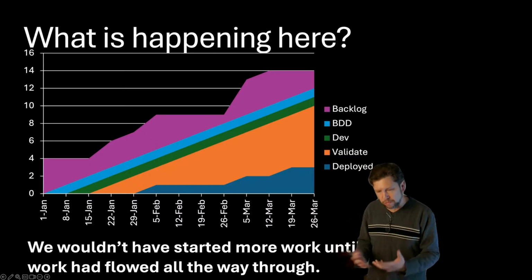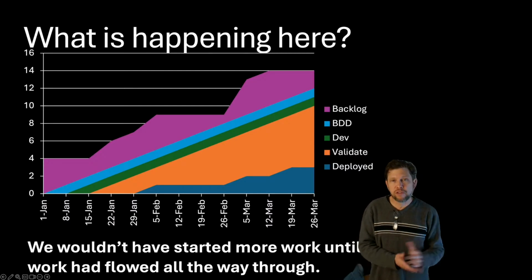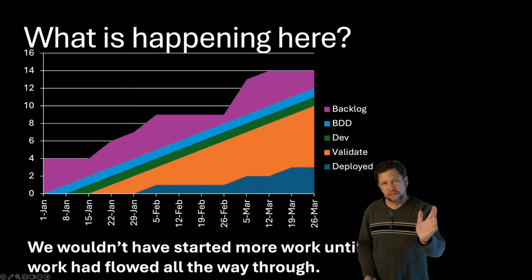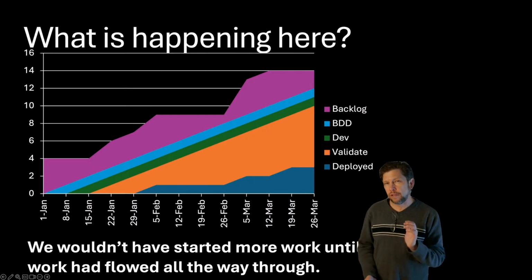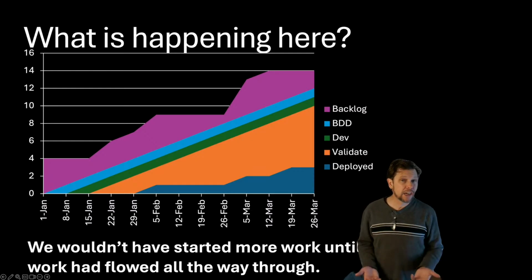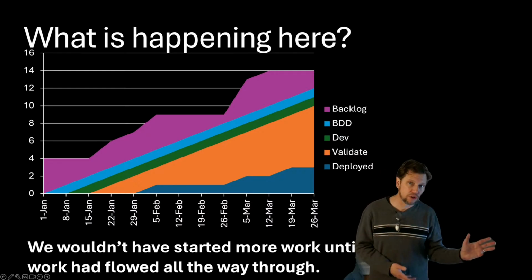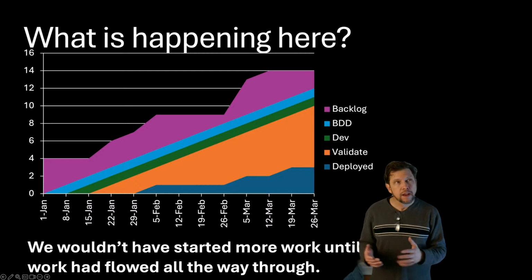And so what I started talking about is, okay, yes, there's nothing waiting to be started, but you've got 20 or 30 things that are still in flight. If we could have delivered 15 of those things and had 15 that you didn't start, that actually would have been more success because you would have delivered something. Even if we had delivered 5 of those things instead of starting all 30 of them, that would have been more success.